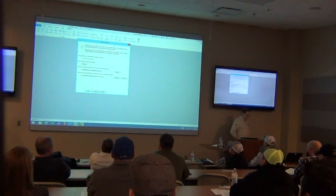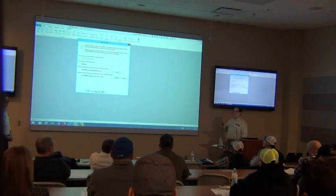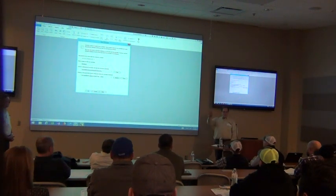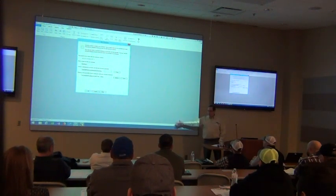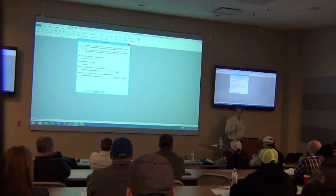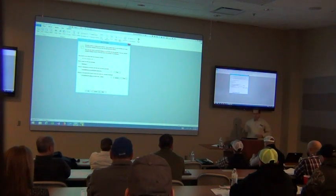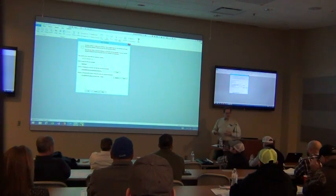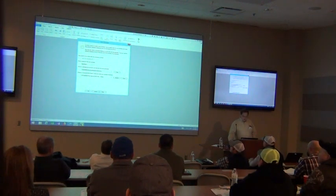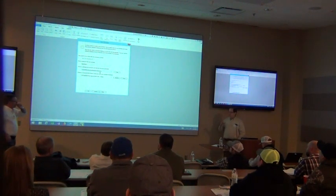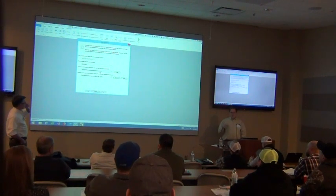Pricing can come from a multitude of varying places depending on your company. When I work with an Excel spreadsheet, my data is pretty much whatever's in that spreadsheet. If one estimator has one version and another has another, that's where estimating systems bring a great advantage — a common database that gives everyone a baseline, no matter who's estimating.